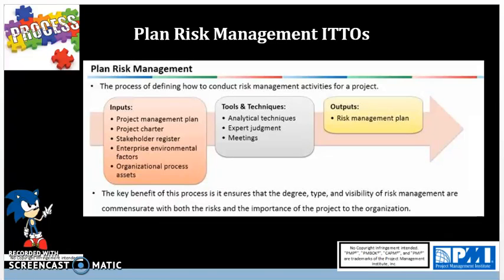And for inputs, we have project management plan, project charter, and this is coming from develop project charter process that houses the signed authorization for the project to begin. It also consists of the statement of work, OPAs, EEFs, the business case, most importantly why we're doing the project, and agreements such as letter of intent or preliminary contracts that were signed as part of the project charter.